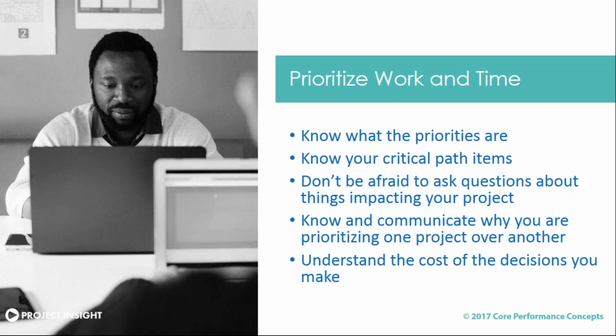I have a situation on one project that I'm working on right now, and it's a risk. We've got some quality assurance tasks. We have some user acceptance testing that's going to happen. The time frame is probably going to be anywhere from 6 to 8 weeks, and there's 5 different entities working together on it. And you're dealing with QA resources that aren't as familiar with the products as the actual users.